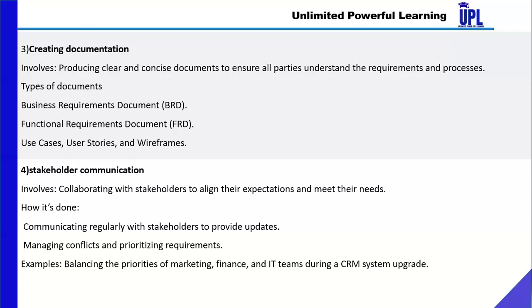Make sure that all the requirements are refined thoroughly, and then the developer starts working on it. This requirement can be broken into many pieces. You can make it into user stories or epics. We generally use Jira for the user stories. Whatever we create, the developers take as stories and start developing piece by piece. Sometimes this Jira also will have a lot of discussion about a particular user story.